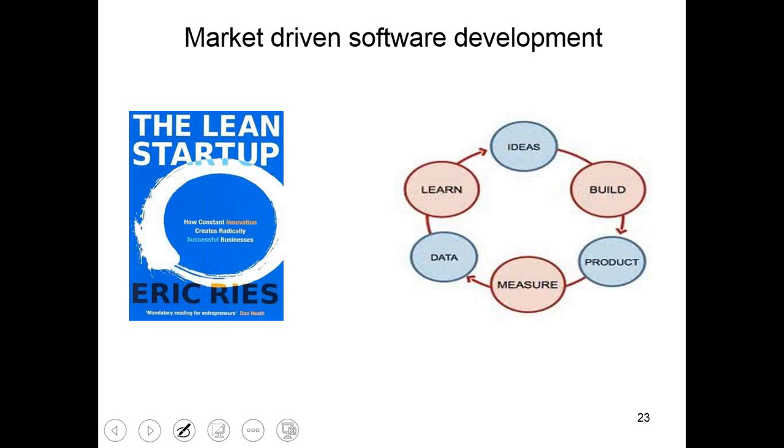Now the constraint with the second approach, if you are following Scrum, is you need to wait for the first sprint to be over for the users to get the login using the Google ID, wait for the feedback from the customer, so your sprint 2 is also gone, and based on that feedback the feature is going to be available to the users only at the end of sprint 3. That's basically 3 months for you if your sprint length is 1 month, and if you're working on a product, especially in a competitive market, that's a lot of time you are giving to your competitors.